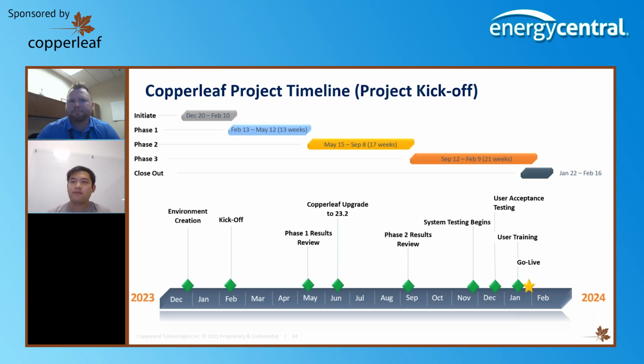but it really depends on that initial model. And I would add one thing: talking about storms triggered it for me, but really any emergent event or failure, right? That particular piece of equipment could have been in your asset replacement strategy. Once that happens, we're the same team that responds to those emergent events, so we can then work to update those plans. We would take that into consideration at the next annual planning run with the tools, and say, all right, we're going to update the data, show that it's a brand new breaker out there, and then get the results accordingly.